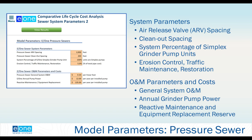Andrew: Are engineering and inspection costs also included? Keith: That would fall under the project cost, which is a percentage — one of those percentage values. We keep it as a wide berth percentage because everyone will have a different idea of what they want to include, so it's set up as a percentage of the project cost. Andrew: When we talk about the project's useful life, what does that mean exactly? Keith: Well, there are a couple of ways to look at it. You really want to capture as much as you can over a period of 20 to 40 years.